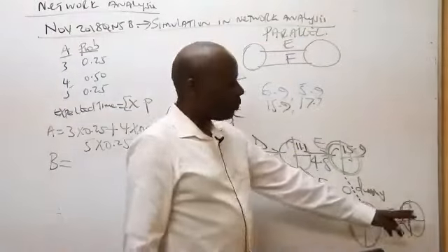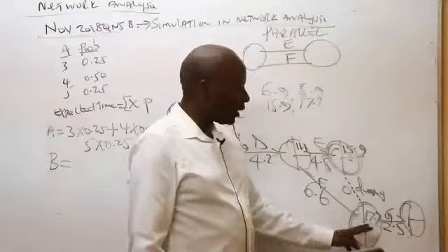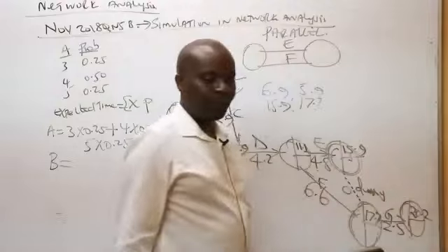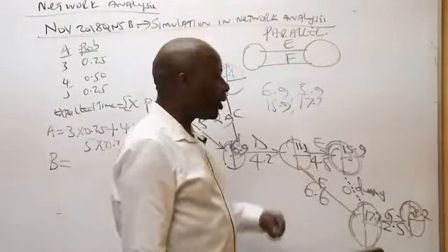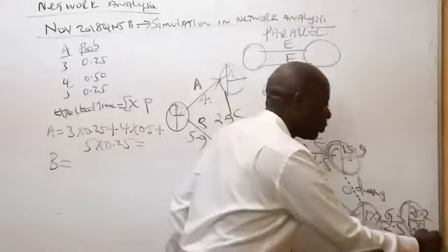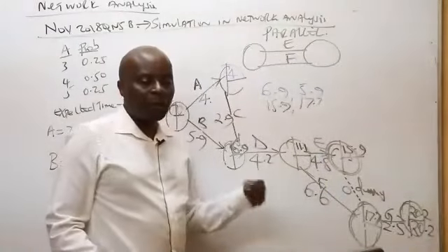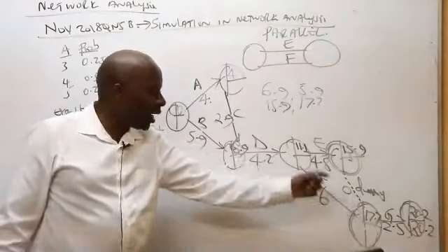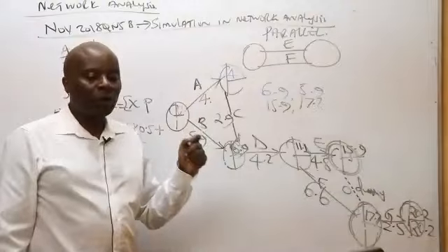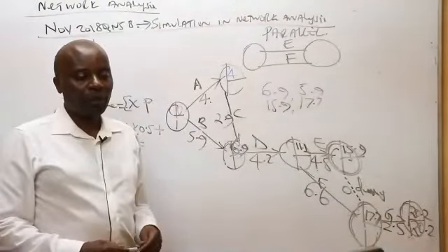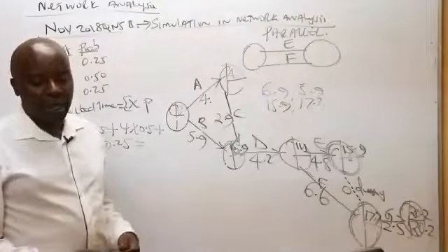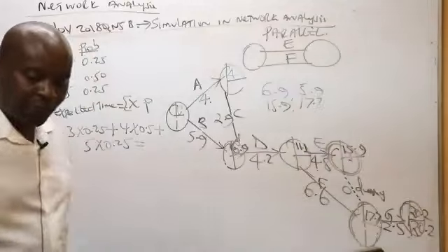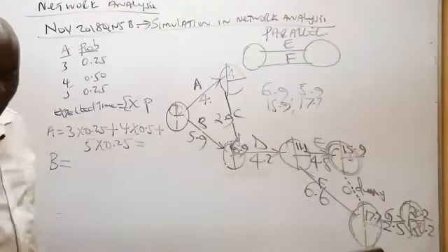And then, of course, there is no comparison here. So here I'm supposed to take 17.7 plus 2.5, which gave you, ladies and gentlemen, 20.2. And then I will put 20.2 here at the very end. And then now you subtract backwards. Now it's backward pass. You move right away from there up to the end here, where we shall be able to get a 0. You keep on subtracting backwards until we get a 0.